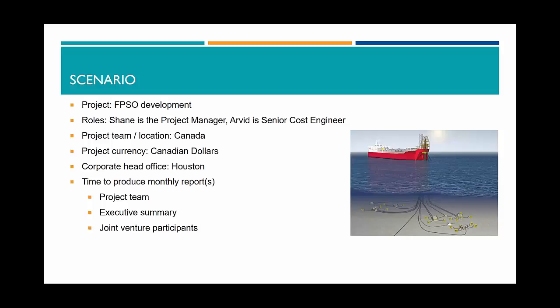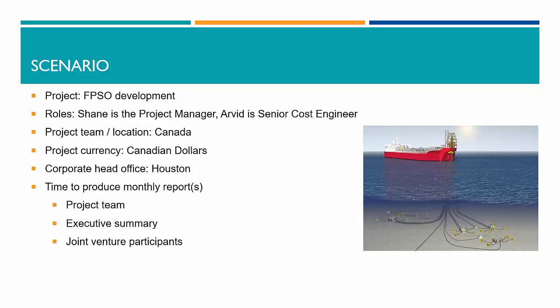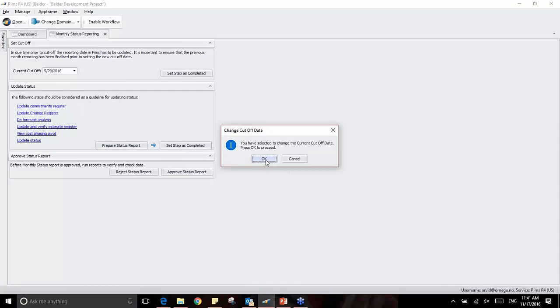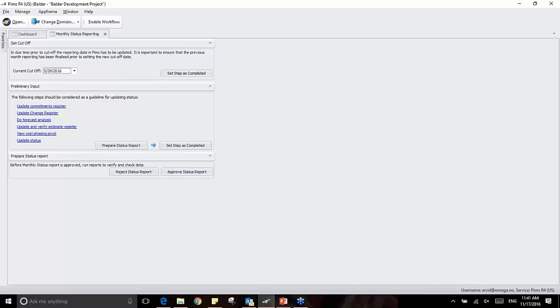So Arvid, show me how Pims enables you to produce the monthly report at the click of a button for my review, please. Thank you, Shane. So let me go out of this presentation and jump into Pims. I'll start here in my monthly status reporting workflow. The first thing I'm going to do is set my current cutoff up till May. As soon as I say OK, all of my April cost and progress figures are now automatically saved and archived for historical reporting purposes.